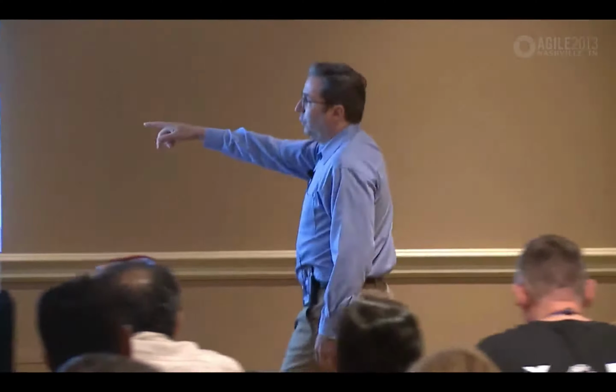If I measured on that, that looks bad. So you know what I'm going to do, right? I'm going to take that person and do what? Yeah, assign them to the second project. Well, they need them 30% of the time, so now I got them up to 90%. That worked so well the second time, I'll do it a third time. Congratulations, clever me, I now have the tester at 100% utilization. I feel good. I pay them 100% salary. I got them 100% utilized. At what cost, though? Right? You're going to see how this plays out in teaming very, very quickly.